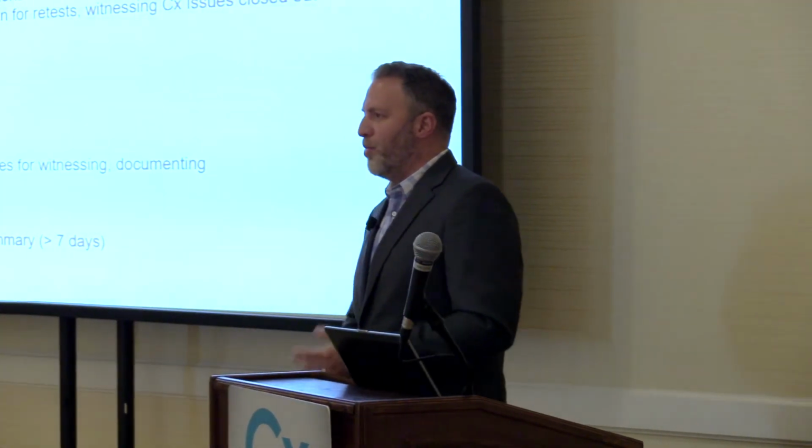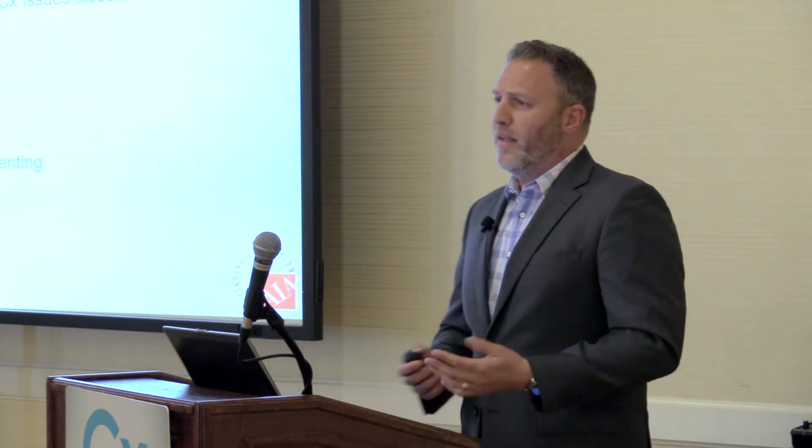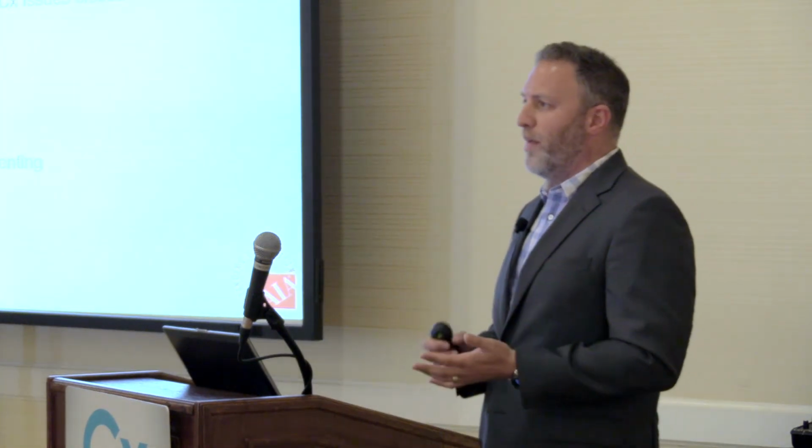This is your time to prove to the owner and to the end user that these systems will indeed work what they need to do. These are quick activities. We're talking 10 to 12 hour days for 2 to 3 days and your level 5s are done. At this point, you've gone through all of your CX issues that you found during level 4, so you know everything's going to work. Now you're just proving it, documenting it for everyone.